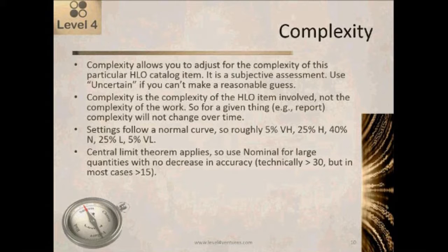I'll say that again. Complexity is a characteristic of the HLO item involved, whether it's a page or report or interface or whatever. It's not related to the complexity of the work that you'll be doing. So for a given thing, for example, a report, complexity will not change over time.